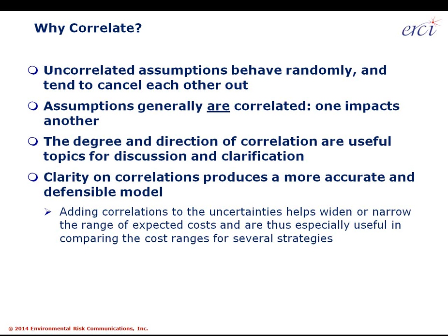Projects just generally tend to grow in scale. They also tend to go the other direction as well. They tend to shrink in scale concurrently. So all assumptions generally are what's called statistically positively correlated. One is going to have a synergistic impact on another.